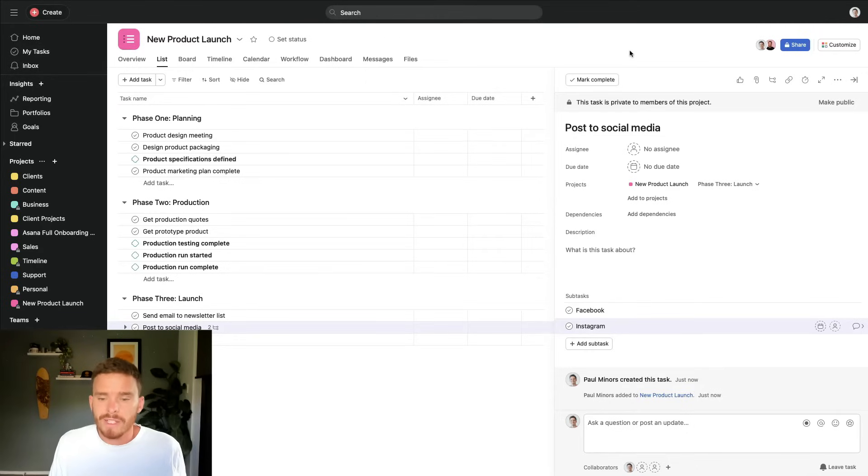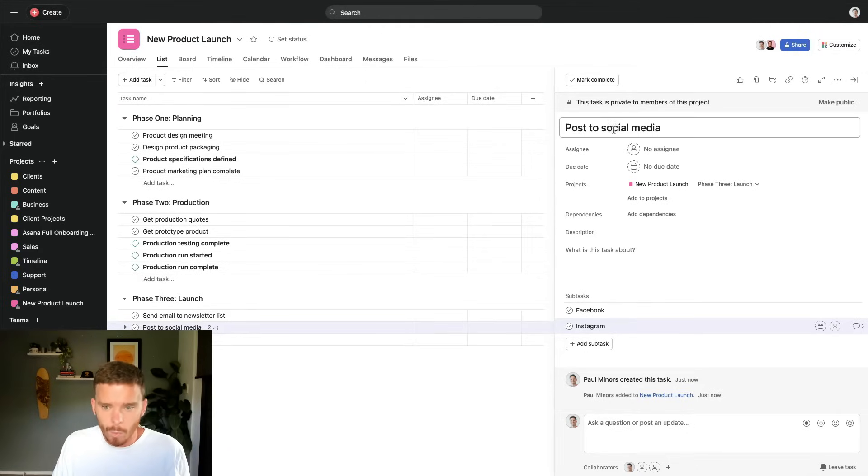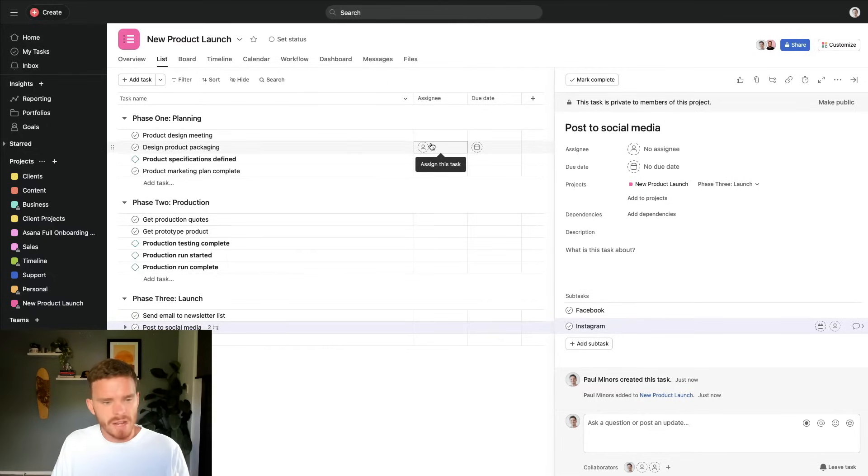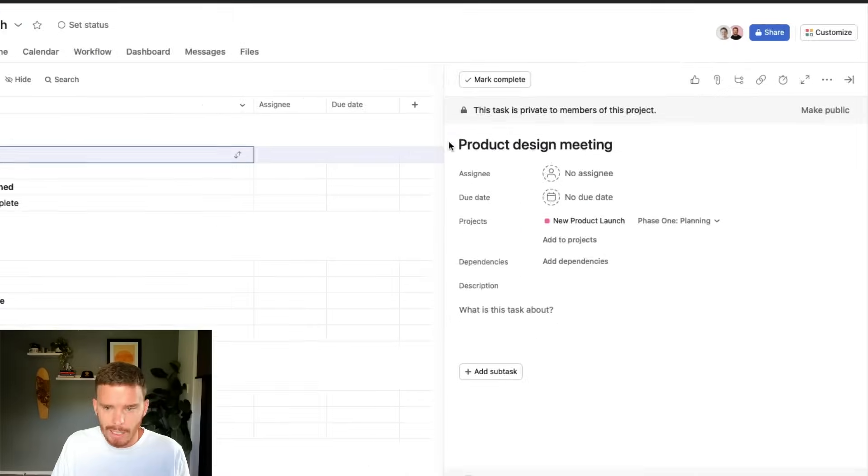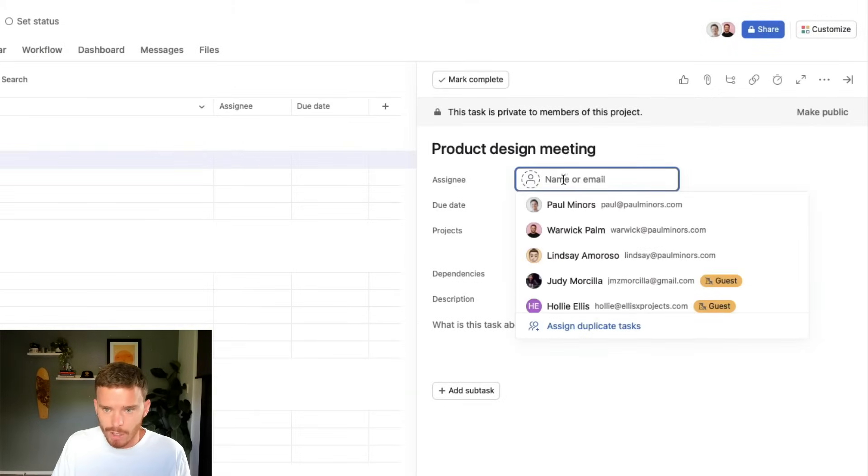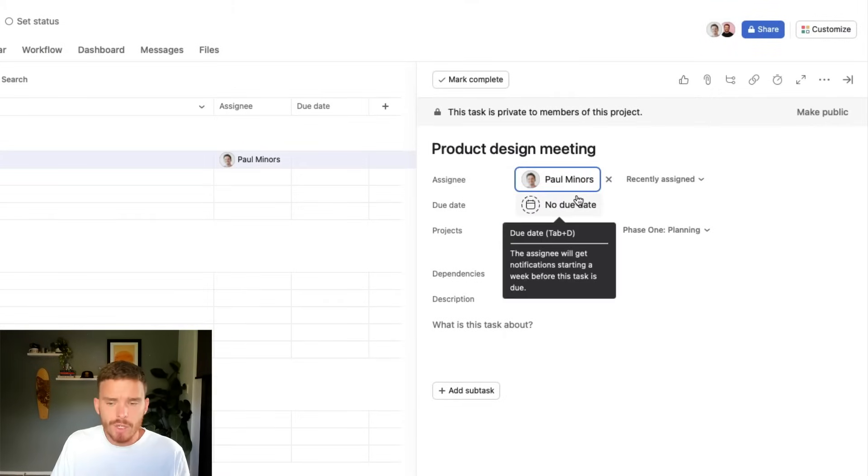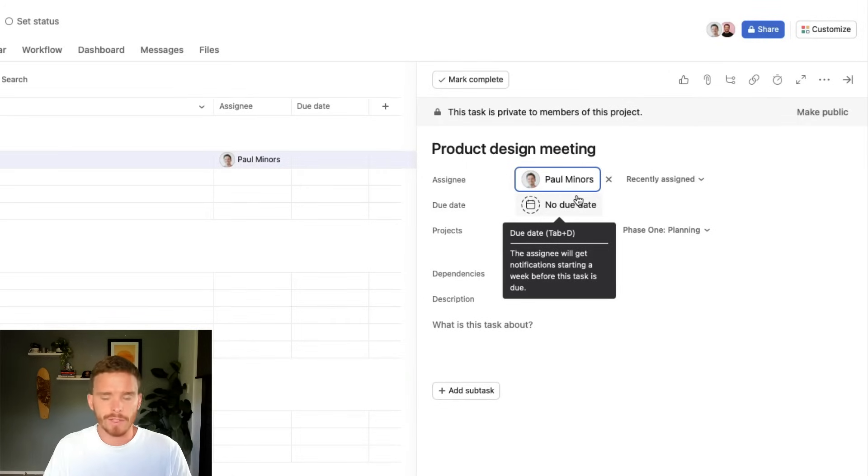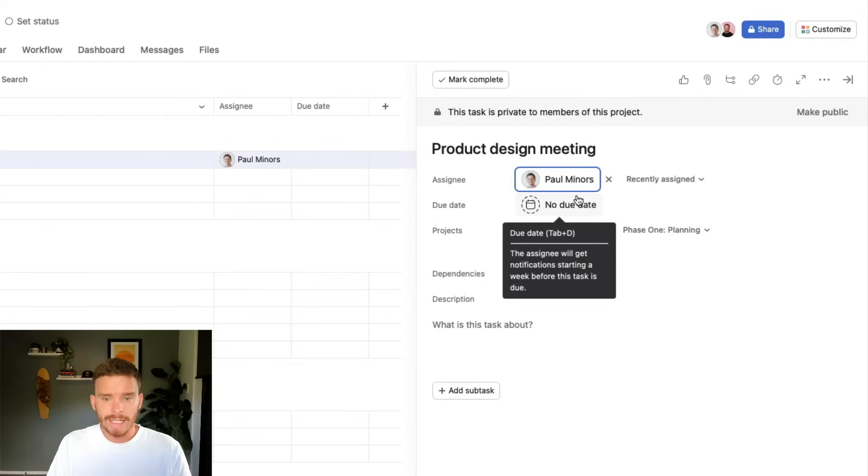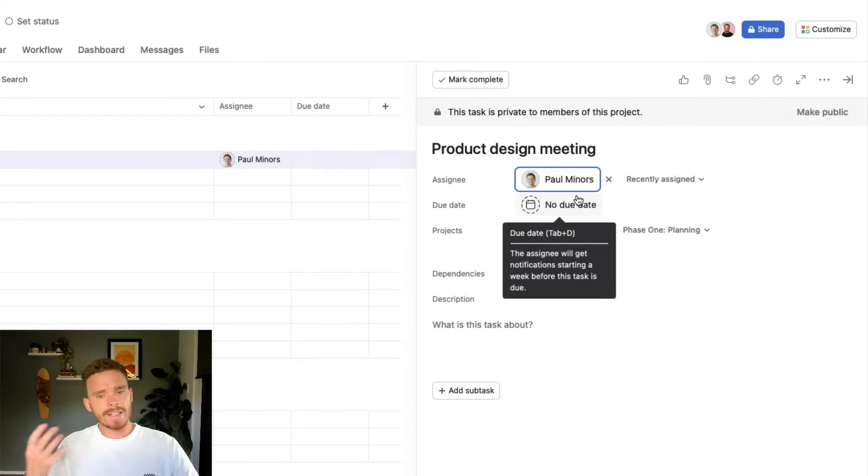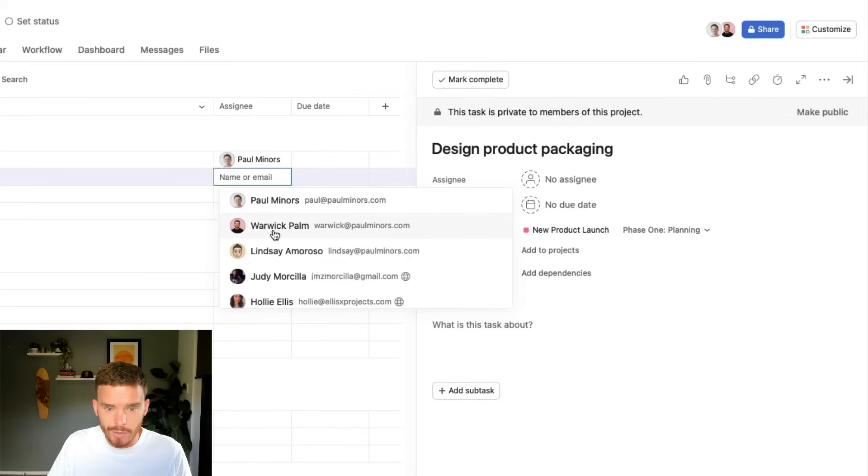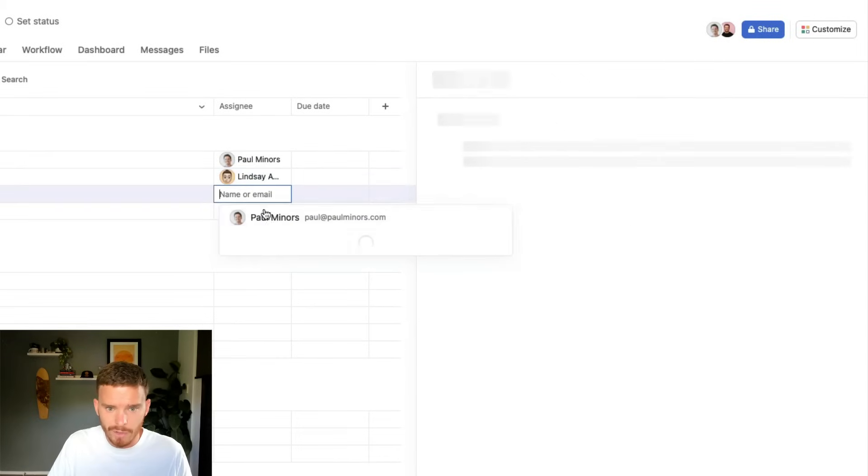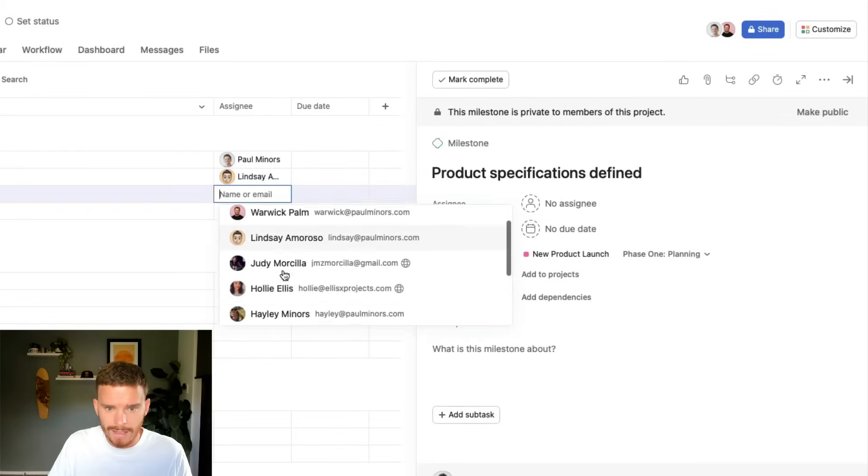Now, arguably the most important bits of information about a task are what is the task about, but also who's doing it and when is it due? Because if we don't assign the task, if we don't have a date, it's probably not going to get done. So if I click on a task, I can choose an assignee and you can only assign a task to one person at a time. This is by design because Asana kind of believes that if you can assign a task to more than one person, each person is going to feel less accountable, like the other person will do it. And so there's less ownership of that task. So Asana does force you to pick somebody on the team to really own that task.